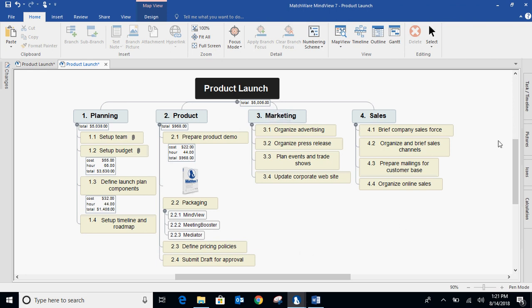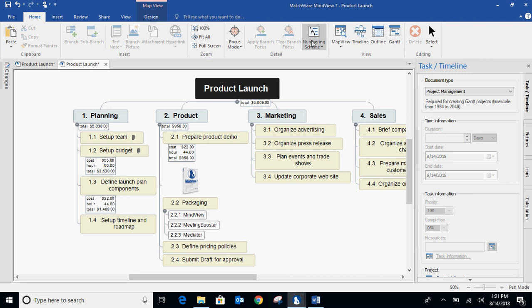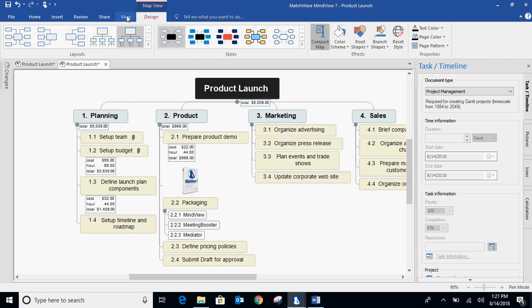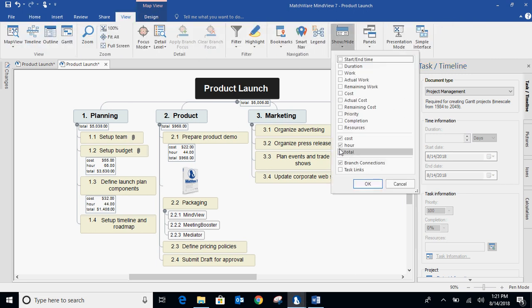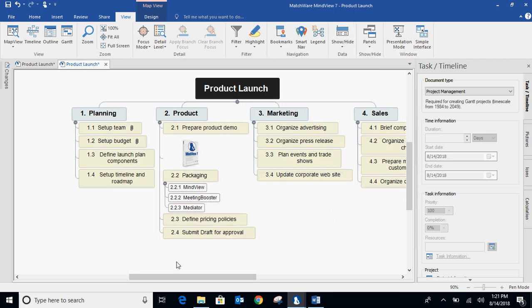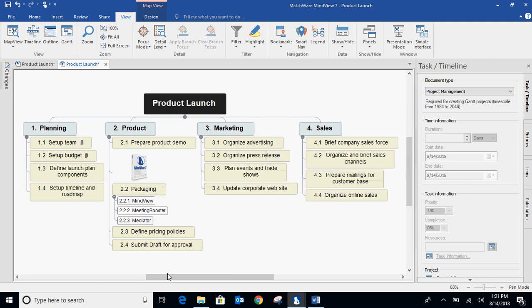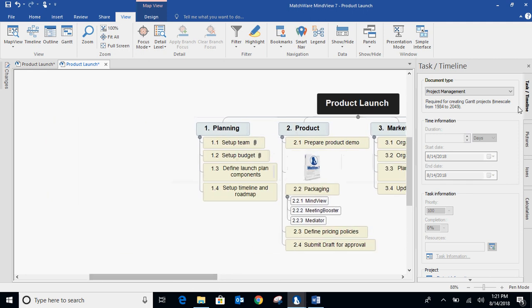And finally, let me show you how to turn this WBS into an actual Gantt chart. What we would do, and I'm going to close or hide some of this information so you can see it a little bit easier. So what I just did is I opened up this panel on the right-hand side. There's a couple rules that we apply to this WBS. One is the project calendar is a 5-day, 40-hour work week, which is all user-defined.